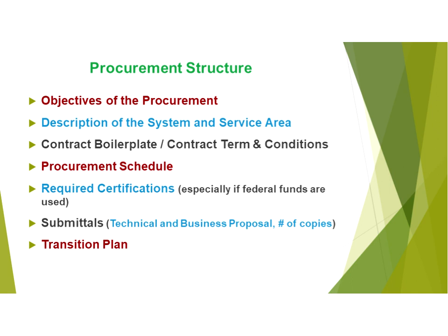The structure of the price sheet depends on the functionalities in the scope, separating the cost of each overall functionality. So you may want a separate price for telephonics, booking and scheduling, dispatch, maintaining a website, even though these are all interdependent. You may want to identify which of the functionalities are optional in case the prices come in higher than what you expect. So again, you want categories for telephonics, booking and scheduling, dispatch, maintaining the website, and maybe a few others.